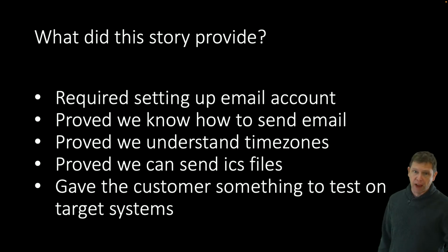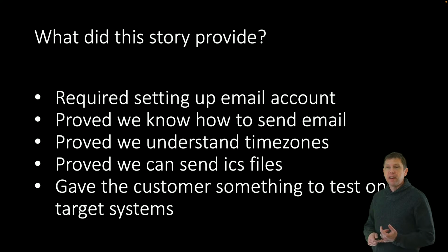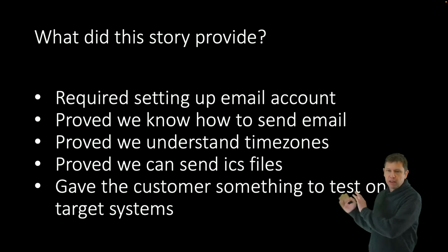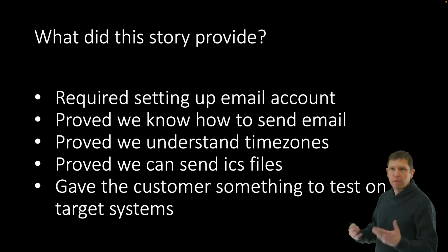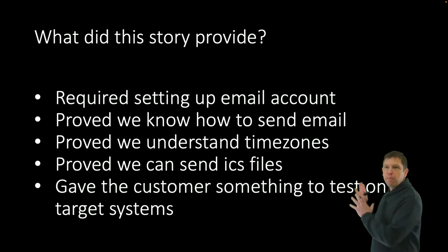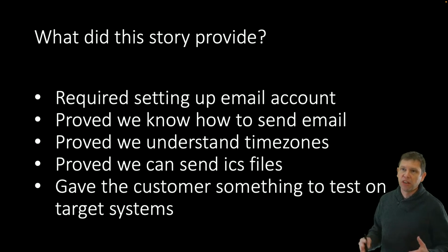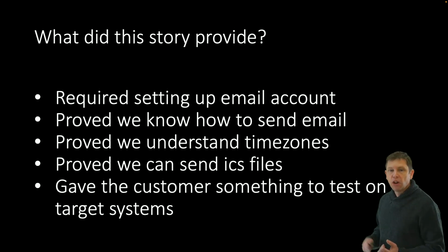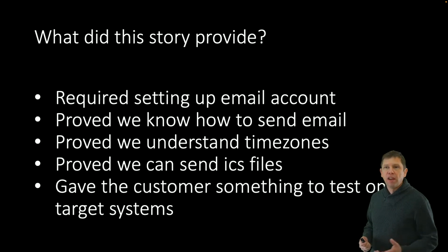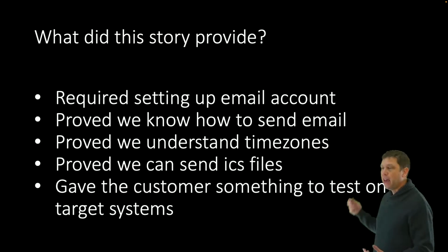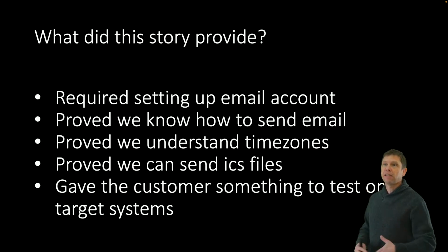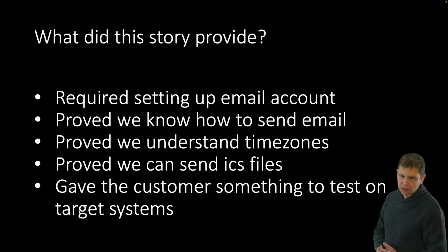But what does this story provide? Well, it required me setting up an email account. In this case, I'm sending it through AWS, but I had to get the credentials for that worked out, which can be as simple as this sounds if we just created a form. Sometimes just getting the credentials in some organizations might take a lot of work. It also proved that we know how to send email. That's not necessarily a given. Depending on your environment, where your server is and so on, that could be a very large task to get the ports open that you need and those types of things.